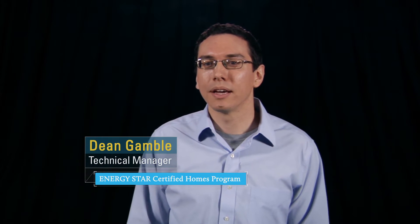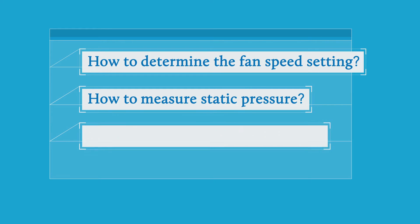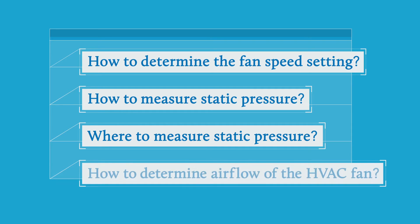Hi everyone, my name is Dean Gamble. I'm the Technical Manager for the ENERGY STAR Certified Homes Program. Our program requires raters and HVAC contractors to measure the airflow of the HVAC fan. This is the first and perhaps most valuable commissioning test to determine whether an HVAC system has been properly installed. In this video, we'll show you why this is so valuable. Then in the following four short videos, we'll show you how to determine the fan speed setting, how to measure static pressure, where to measure static pressure, and finally how you can use those two things to determine the airflow of the HVAC fan.